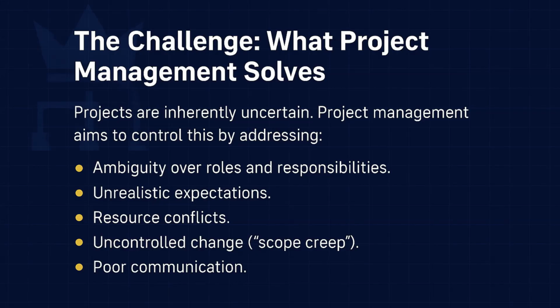And then it moves into the next process, initiating a project, or IP. IP. This sounds more substantial. It is. This is where the real foundational planning happens. The IP process is where you create the key document called the Project Initiation Documentation, or PID. The PID, I've heard of that. What's in it? It's the project's blueprint. It defines the justification, the detailed business case, the scope, the quality requirements, the risks, the management approaches for all the practices, and crucially, the plan for the first delivery stage. It pulls everything together so the board can make an informed decision to actually authorize the project.